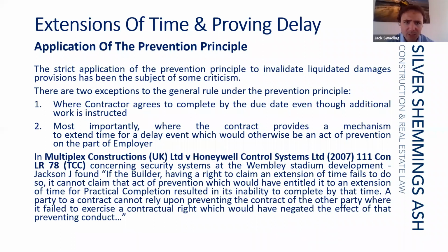This is what I was talking about when I mentioned that contractors will also often look to the extension of time provisions to see whether there are gaps and whether something that the employer has done does not entitle them to an extension of time under the extension of time provision, so can be said to be an act of prevention which puts time at large under the contract.